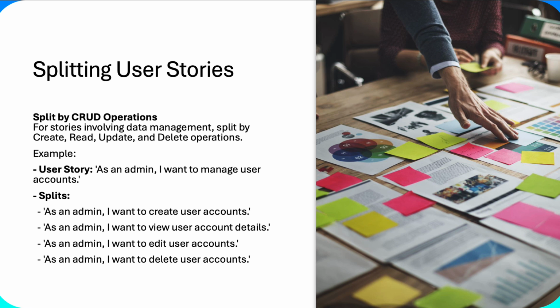So for example, here, as an admin, I want to manage user accounts. Well, I have a table, maybe with user accounts, and so you want to split them up: I want to create a user, I want to view a user account, I want to edit the user account, or I want to delete the user account, and making these all individual stories.